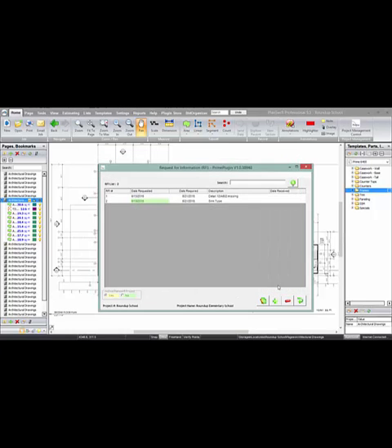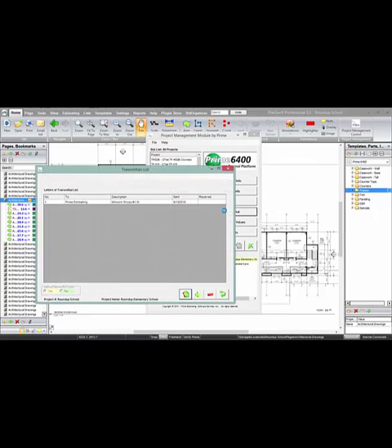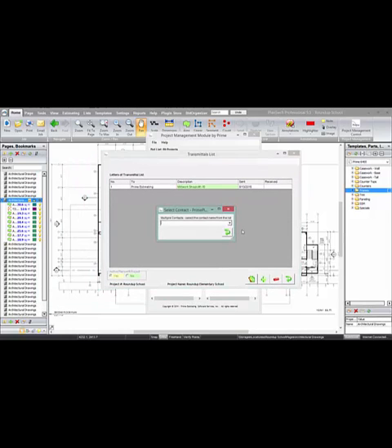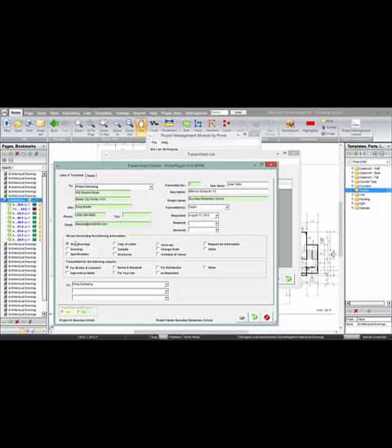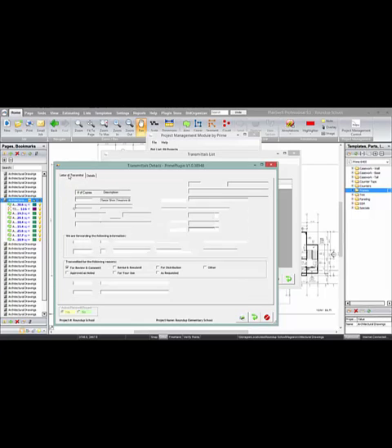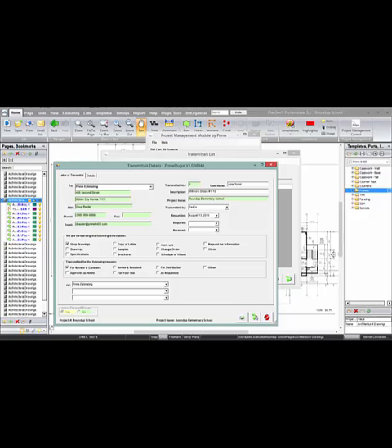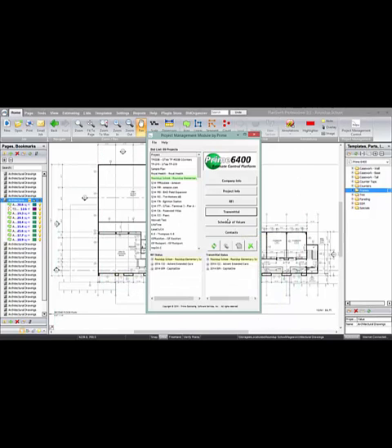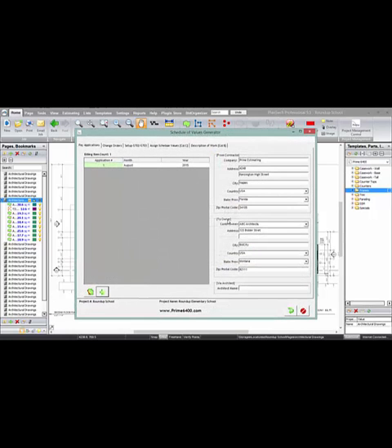We also have an area here to prepare your transmittals. Same thing again, we have our log of transmittals. We'll open up an existing one, and within this log it will ask us what we want to send. Shop drawings, we'd like them reviewed and commented upon, and we're going to send them shop drawings of that description. Again, this can be printed or PDF'd and sent with your submittal. That's your transmittal.